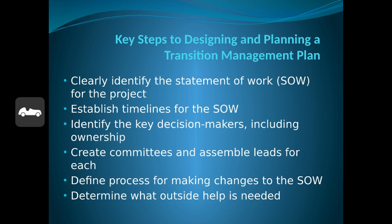So when it comes to reviewing contracts, make certain that if you have a specific company who's going to be subcontracting to someone else, that if they're going to offer it as a pass-through, like they're going to do it on their behalf and help you out, they're also not taking a 15 or 20% markup and taking a $10 item and making an $11.50 or $12 item and passing it through to you, when your team could have gone directly to that provider and gotten the reduced price.